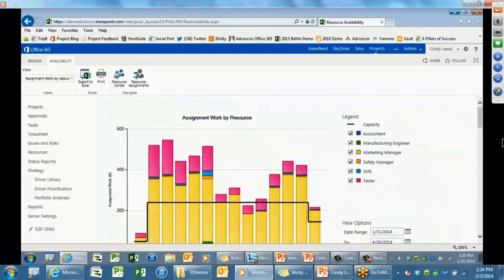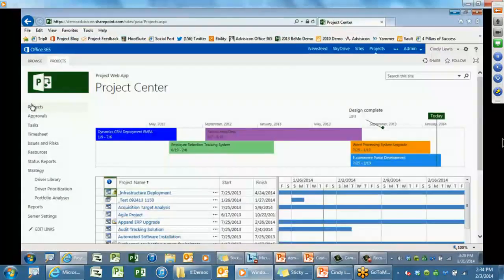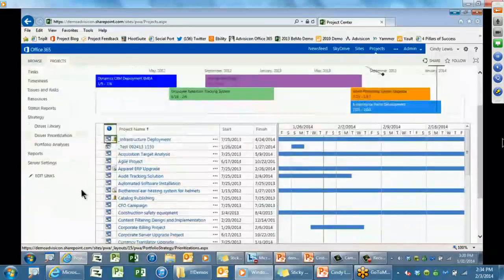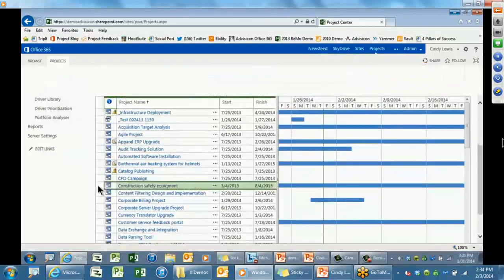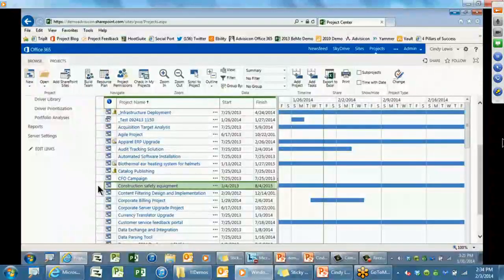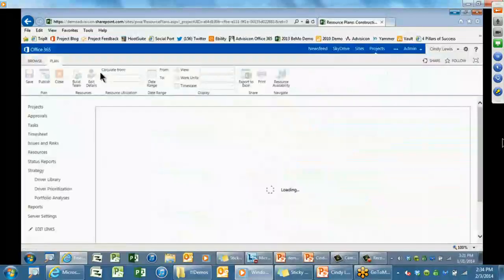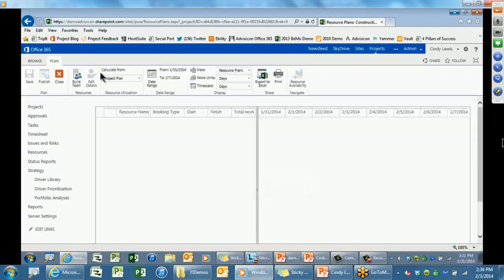So what you can do is take a project that already has a schedule in it that's fixed, let's say it's fixed for 6 months, and do a resource plan for the second 6 months. If you follow PMI, that's more of a progressive elaboration approach. So there is an option in the resource plan where you can say, okay, what I'd like to do is set the schedule until this date, then refer to the resource plan. So that's a great way to forecast future work. You can do that with project work, operational work.